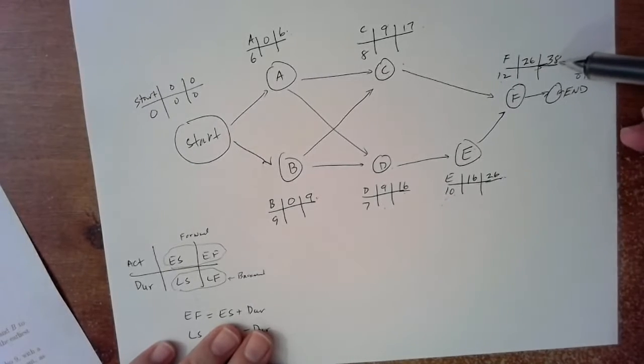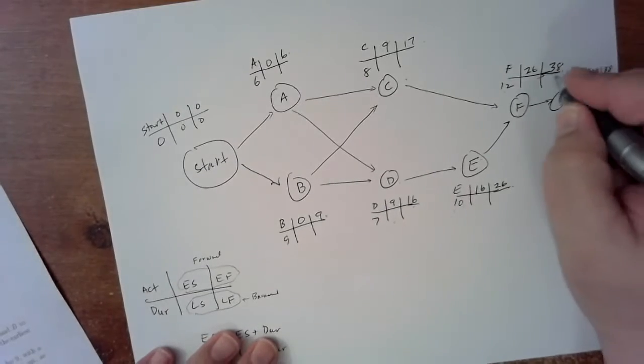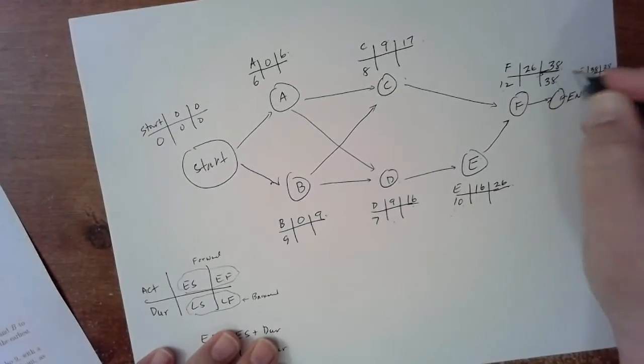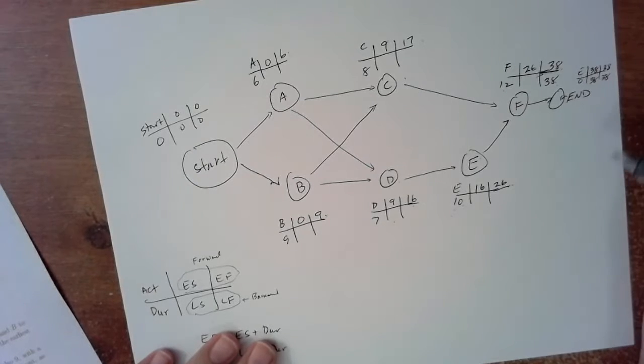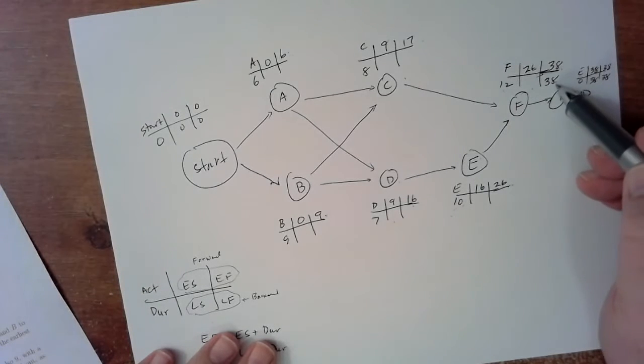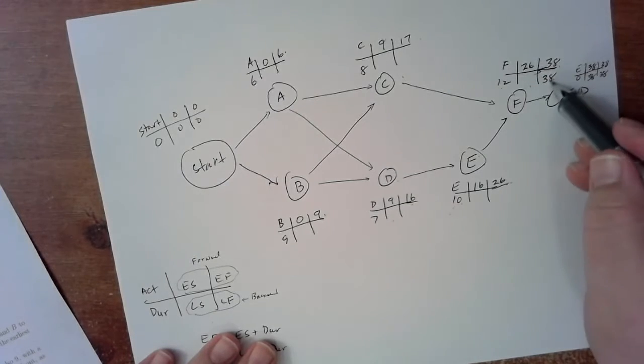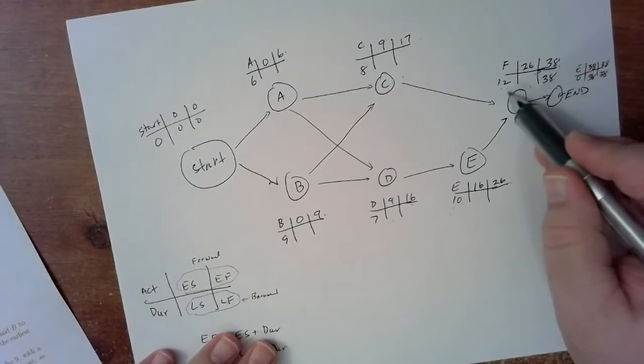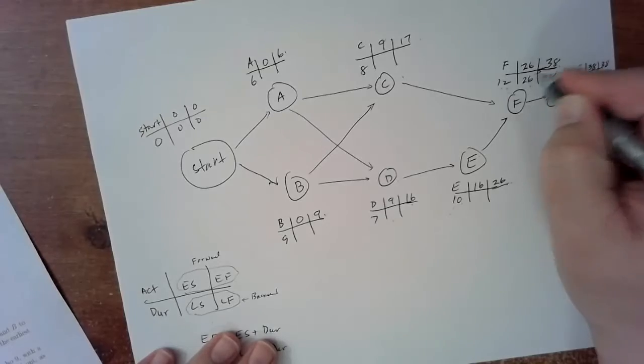And so we're looking at the time here. We need to start things off with the latest finish time. And so we're able to get the job done in 38 minutes, or 38 units of time. So let's go ahead and put that in as our first latest finish. So then what would the latest start time be? It would be 38 minus 12, which is 26. Good.